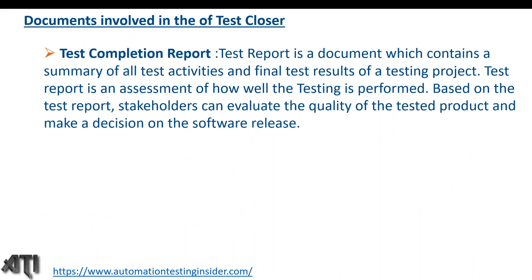Now, what are the documents involved in the test closure process? The test completion report is the most important one. It is a document that contains a summary of all activities and final test results of the testing project. The test report is an assessment of how well testing was performed, and based on it, stakeholders can evaluate the quality of the tested product and make a decision on the software release.